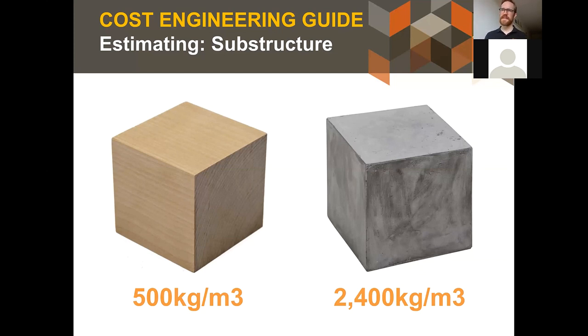And lighter buildings typically require smaller footings or maybe fewer piles, and that can have a really significant impact on the cost of the project, particularly when you're building with contaminated soils, or if you wanted to build over an existing project in a vertical extension. The lightweight of the timber option can really have that good value. So it's something that you should really be checking for.